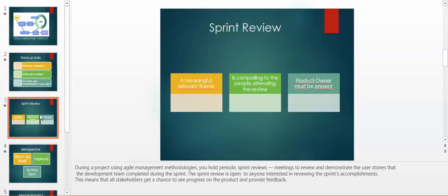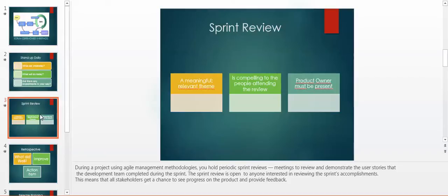The sprint review is open to anyone interested in reviewing sprint accomplishments, and this means that all stakeholders get the chance to see priorities on the product and provide feedback. We have to choose a meaningful, relevant theme that is compelling to the people attending the review. And last but not least, the product owner must be present because he represents the business.